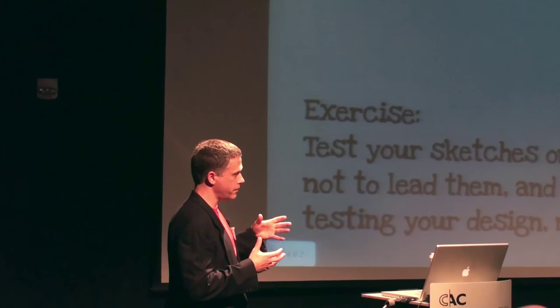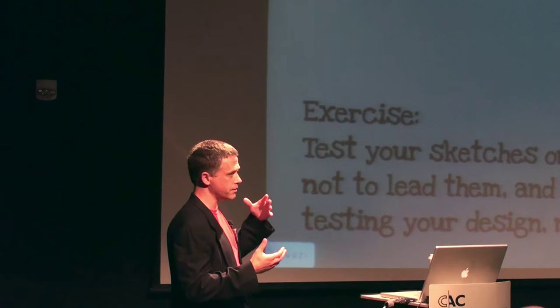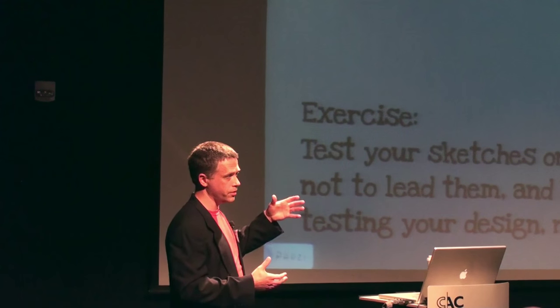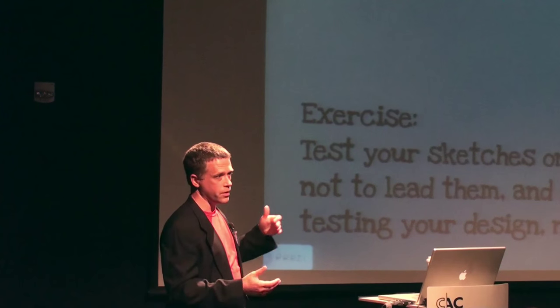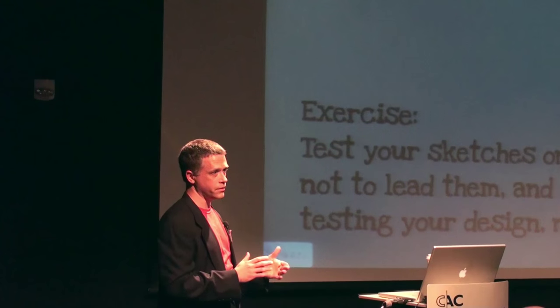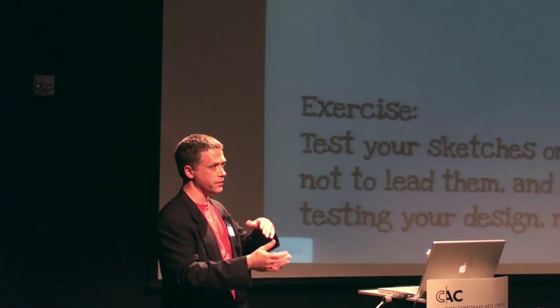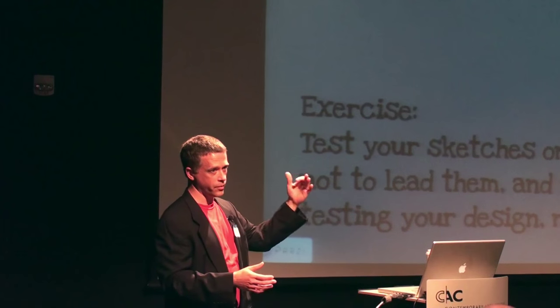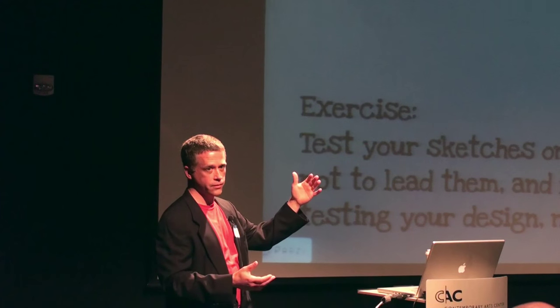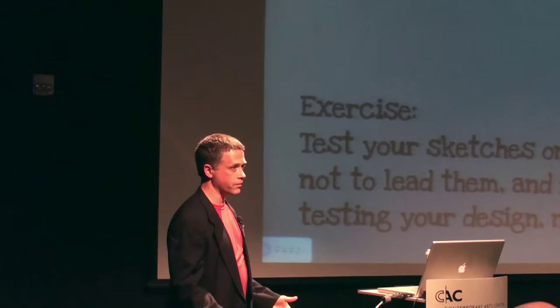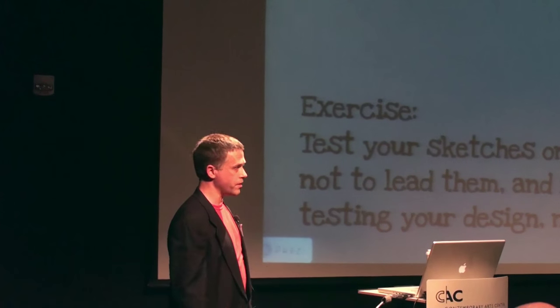What I suggest is larger studies that you would do maybe with 20 users, you'd probably do out of sprint activities. So you might line up, keep your developers going for 3 weeks, and then during that same 3-week period of time, maybe set up a larger test and run a larger test with more people to get other feedback.